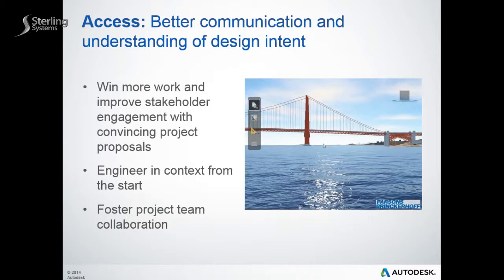The preliminary design model elements can be brought into Civil 3D in order to create the exhibits that are often required for the 30% plan submittals, including approximate right-of-way plans, plan and profile sheets, and first-run cross-sections. In addition to the 2D plan documents, participants can explore the 3D model in Infraworks during preliminary design review meetings. Possible scope changes can be more easily evaluated and considered since adjustments can be made to the model on the fly during the meeting. Once the agreement has been reached, teams can continue refining the model in Infraworks and bring these model components into Civil 3D when it's appropriate to begin more detailed work.